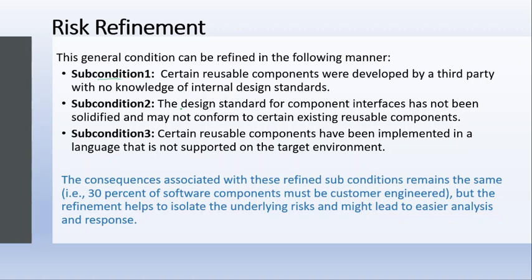Likewise, we can also check another condition, because we refine on the different conditions. The third condition here is that certain reusable components have been implemented in a language that is not supported in the target environment. So these are some conditions that we do refinement on.